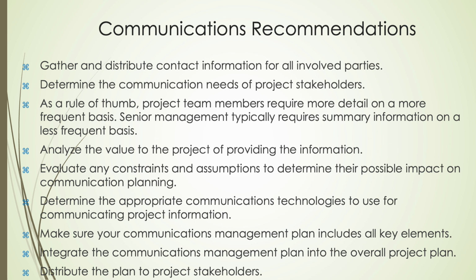Carefully evaluate constraints and assumptions that could impact communication efforts and select the most appropriate communication technologies to ensure timely and efficient information sharing. Once the communication requirements are clear, a comprehensive communications management plan should be developed, ensuring it addresses all key elements such as stakeholder roles, information formats, timing, and delivery methods. This plan must be integrated into the overall project plan and shared with all stakeholders to establish clear expectations. Proper communication planning not only ensures that the right information reaches the right people at the right time, but also strengthens stakeholder engagement and project alignment throughout the project lifecycle.